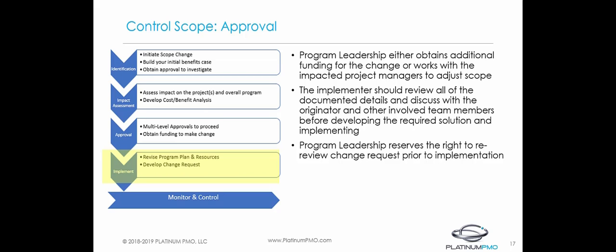their planned work streams. Now here's where it can get a little bit tricky on what to do with your change request next. It all really depends on where you are in the life cycle of your program. If you are in the initial development stage or earlier of your program, you will just take on this work as part of what you need to do for preparation for system and integration test. If you're already in system or integration test, the challenge is to get this change in as soon as possible.